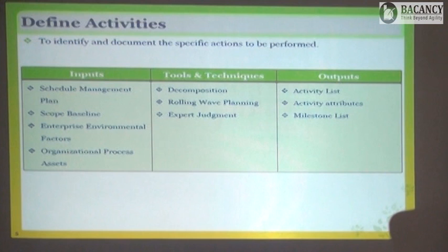And then you have internal dependencies and external dependencies. Internal dependency is what? Suppose you have mixed them and now it is ready to serve. Before that you need to take approval from the quality team. That is the internal dependency. External dependency is, if you are constructing a building, you need to take a certificate from the fire department. And suppose in the market tomato is not available, so then spices are